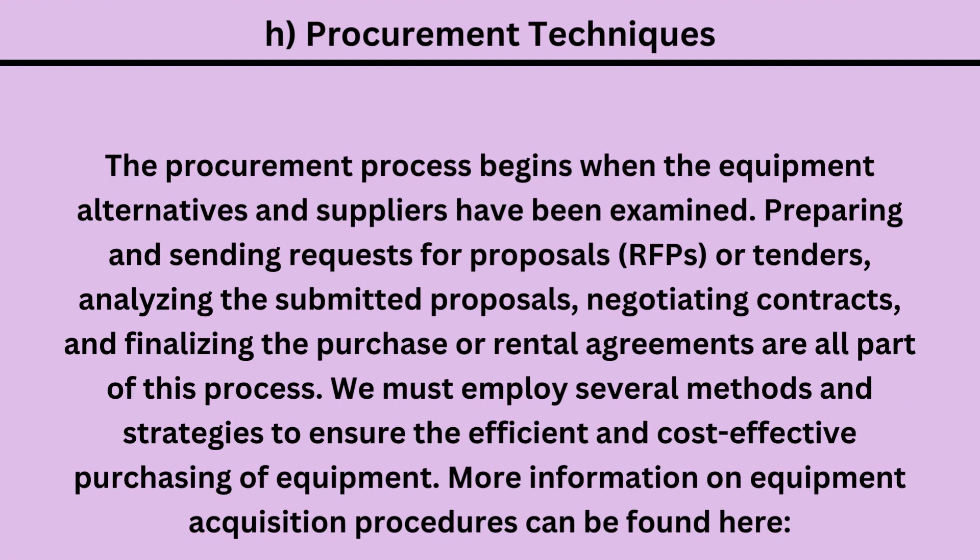H. Procurement techniques. The procurement process begins when the equipment alternatives and suppliers have been examined. It involves preparing and sending requests for proposals (RFPs) or tenders, analyzing the submitted proposals, negotiating contracts, and finalizing the purchase or rental agreements. We must employ several methods and strategies to ensure the efficient and cost-effective purchasing of equipment.